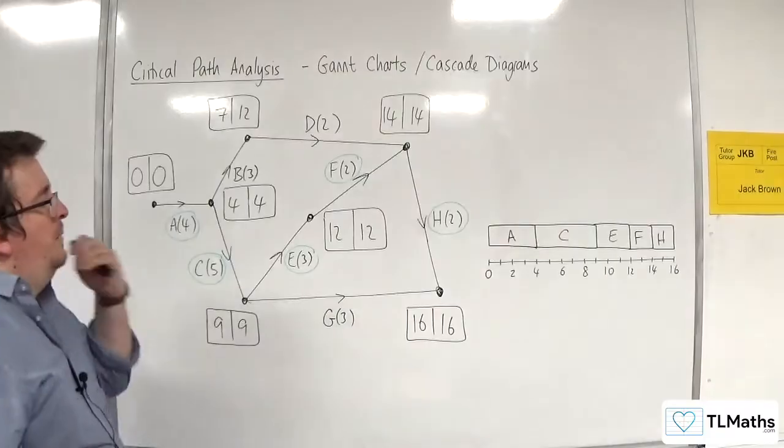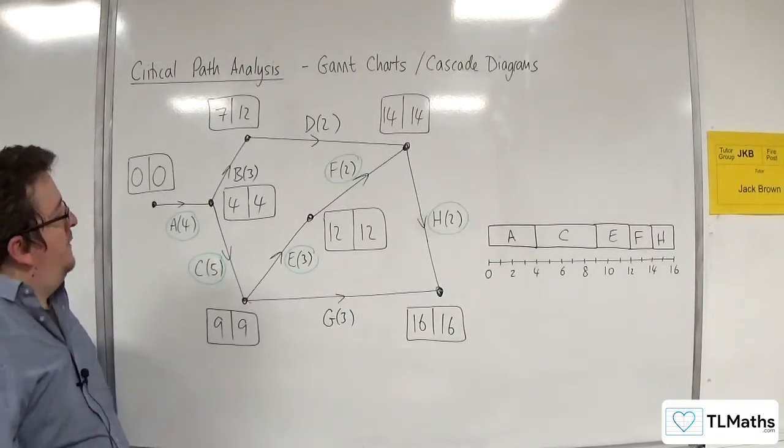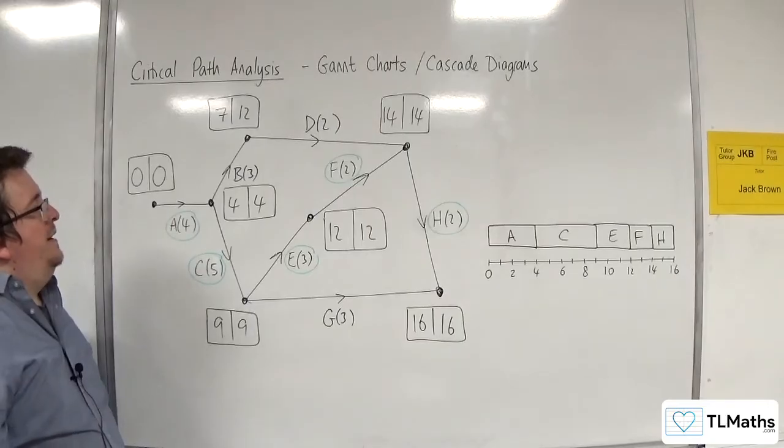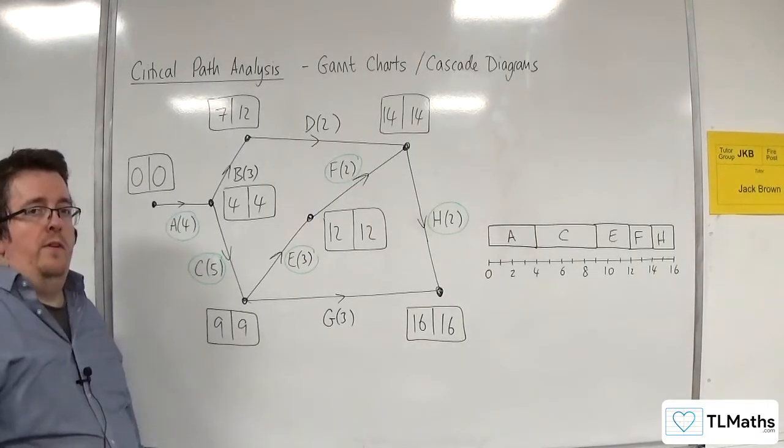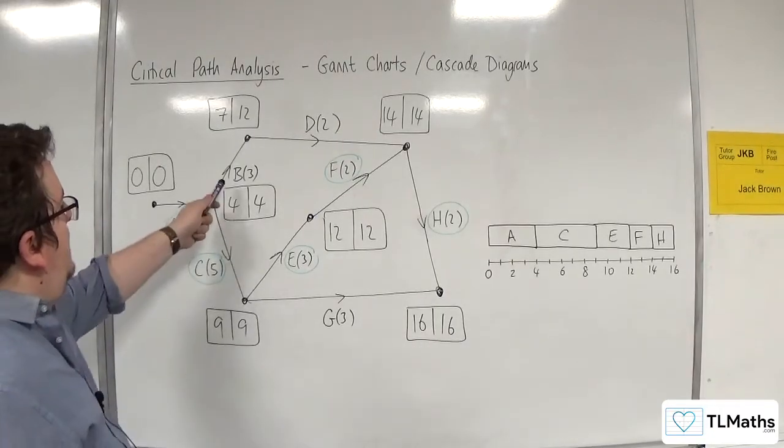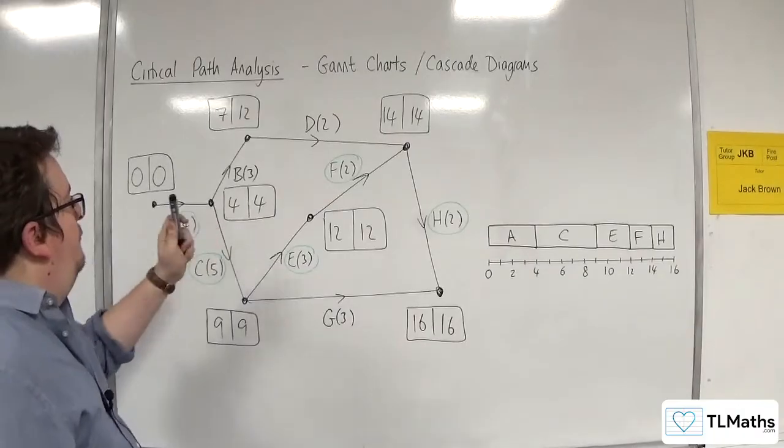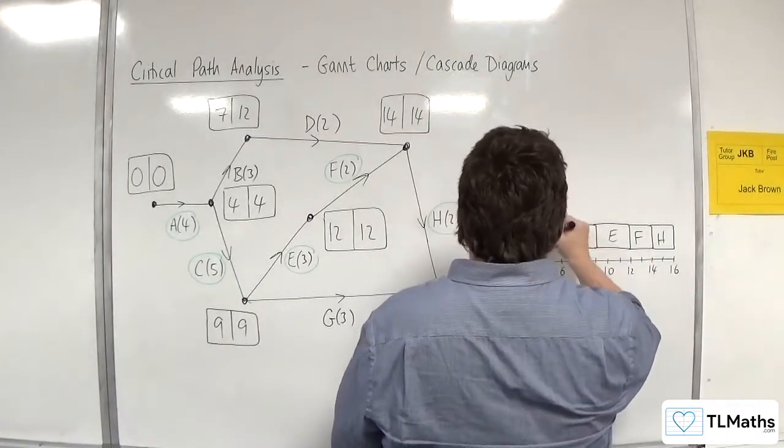So then what we need to do is draw in all of our other activities. Now, the other activities need to be drawn in with their float as well. So B can start at 4 - that's the earliest time that B can start - and it lasts 3 hours.